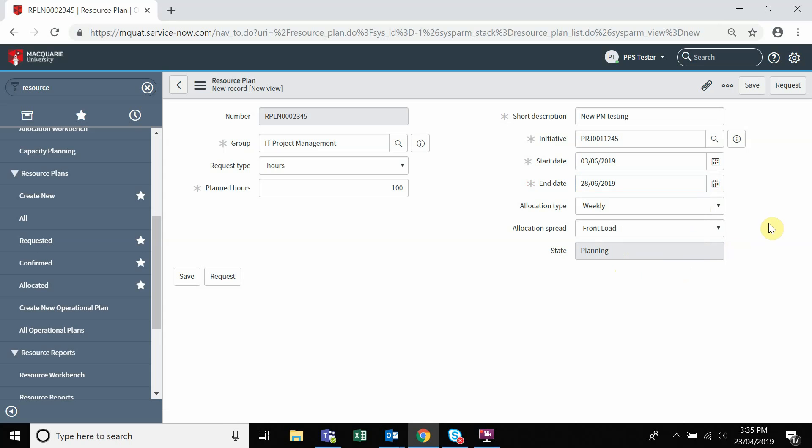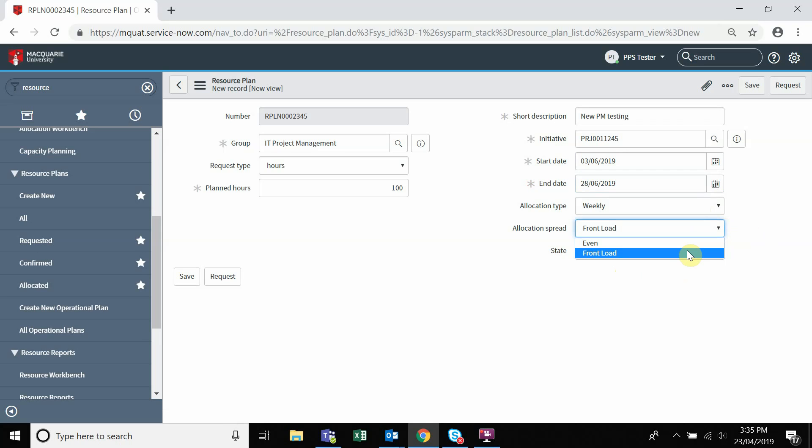In the allocation spread, you'll find two options from the dropdown. Even allocation is across the duration of the specified time period, whereas front load is working full time until the requested hours run out.